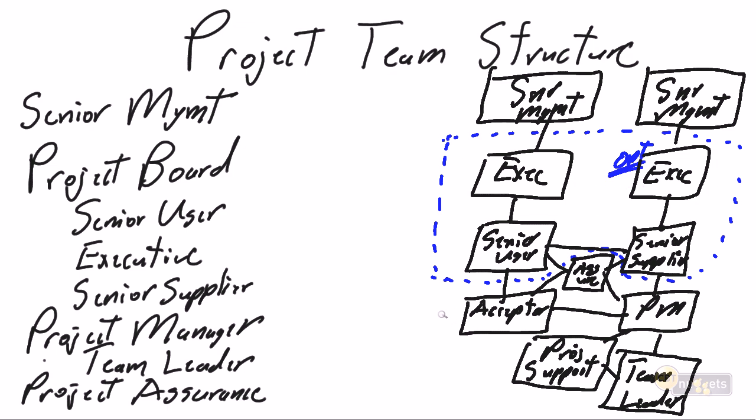We have added a new role in here that's called the acceptor, and it's entirely possible that the senior user and the acceptor can be one and the same. Again, it's going to depend on how large the organization is, how many other day-to-day responsibilities the senior user is going to have in day-to-day execution of the customer, of the business community. But often the acceptor will be a separate delegated position to ensure that there is somebody there to work day-to-day, hand in hand with the PM to ensure overall project success.